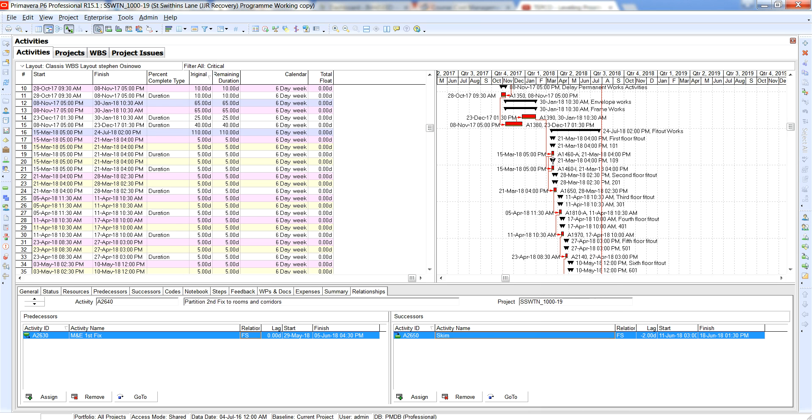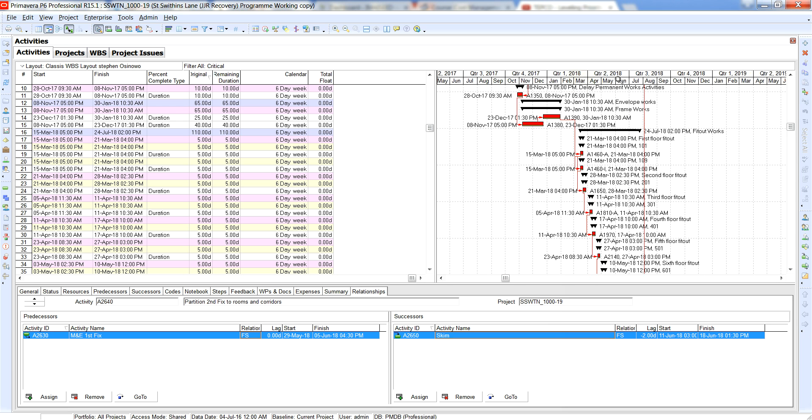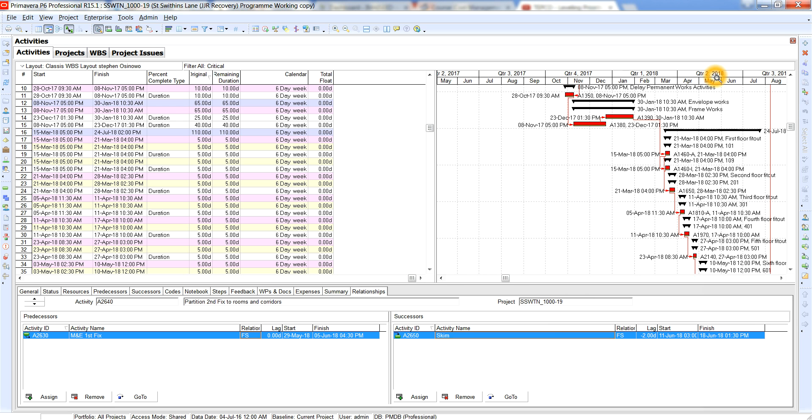For instance now these two activities here, if either of these two activities were to start late then we have a huge problem. And the same with all of these others, they all start more or less within the same sort of time span.